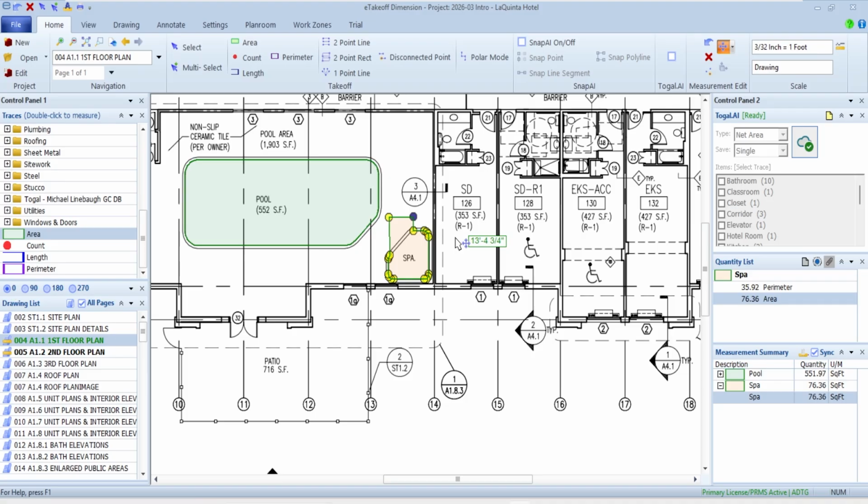With that being said, this is also where it could be an assembly. If you think about an assembly, it could ask all sorts of questions about length of the wall, height of the wall, how many layers of drywall are on each side of the wall, and things of that nature. So all those same variables that you've got in estimating come over here to eTakeoff, so that I can see those from this perspective.